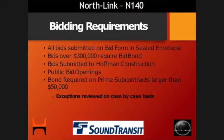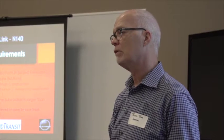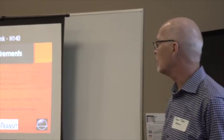The openings are in public. By that we mean that after the date and due time, let's say it's 2 o'clock on December 23rd, then immediately following, we will open the bids in the presence of the owner and any subcontractors or bidders that would like to be present to hear those openings. They're recorded, and you're welcome to take away a copy of the bid results as they're recorded on that day.